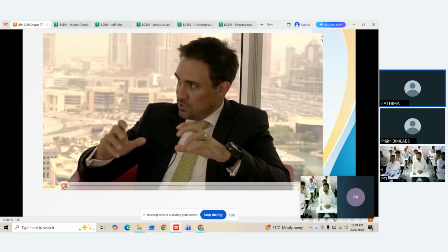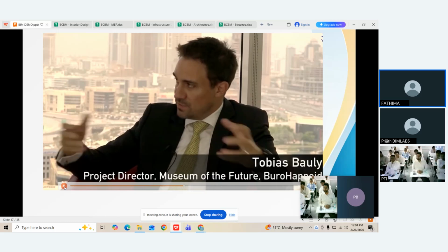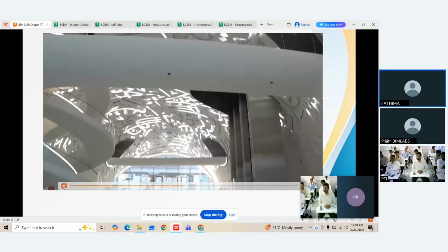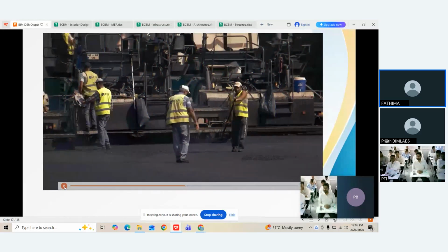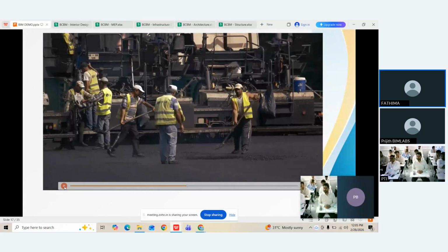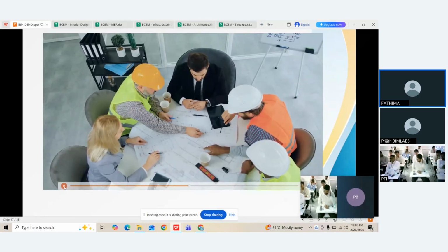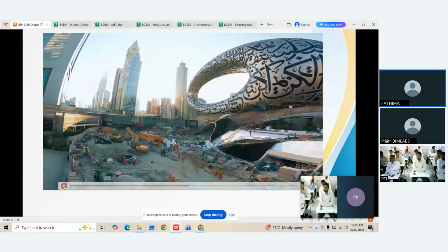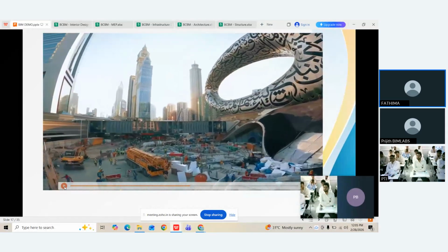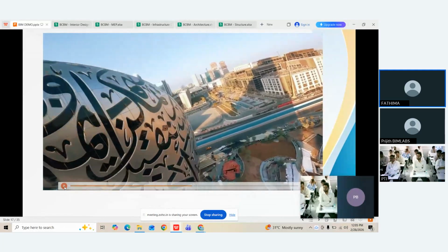We believed it was a major risk, but it hasn't happened. It all fits so well, Fowley remarks. You've already gone through the pain in the digital model, so stick to what you draw. The amount of labor put into the modeling part of things nearly makes it boring. The coordination of MEP engineering began considerably earlier in the project, so difficulties were resolved long before work moved on site. The museum's facade is about 60 to 70% complete.